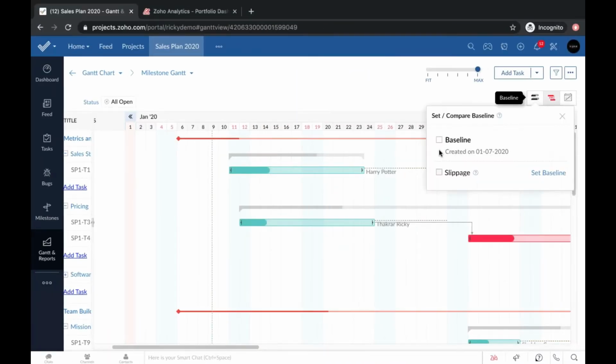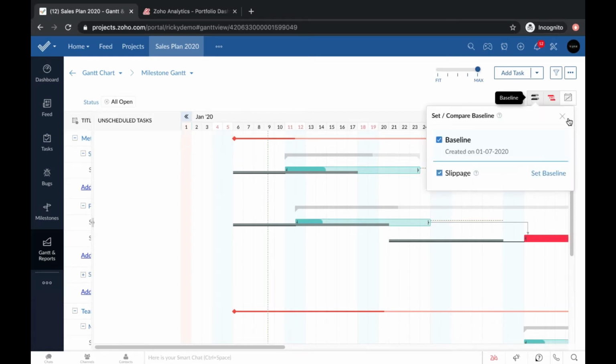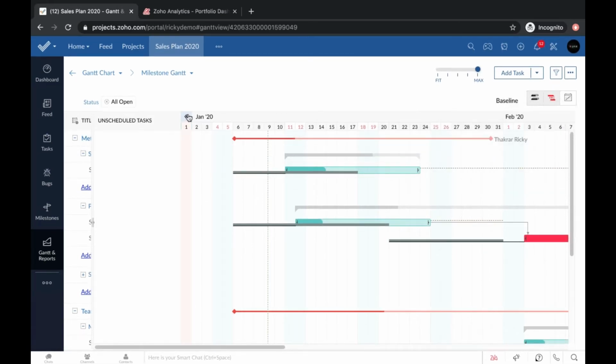So over here, we can turn on the baseline. You can actually have multiple baselines. Why would you want multiple baselines? Well, in January, you have a baseline. And then in February, everything has moved around, so you want to create a baseline for February too, because that's really the new path that the project is on. So then in March, you can look at your January baseline, then you can look at your February baseline. Have we moved much? Are we still on target with the February baseline? That would show good results, or kind of good results on the project itself. So you can have multiple baselines, and it tells you the date that that particular baseline was on. You can delete it, you can add another one, you can compare two baselines. It's a pretty cool feature once a project is live. And then you have slippage and variance.